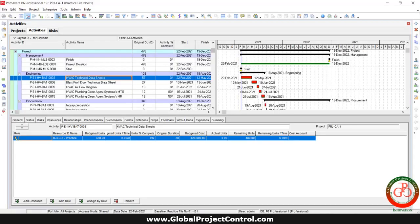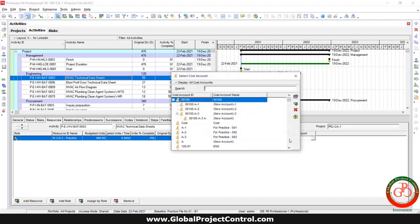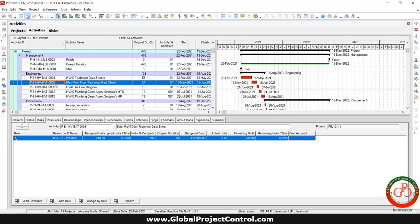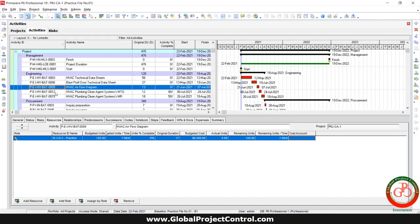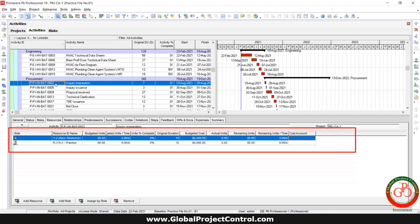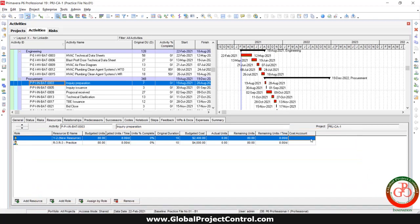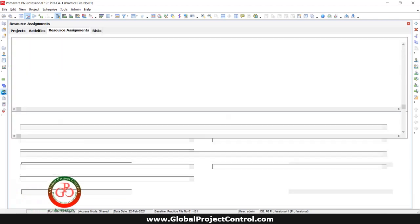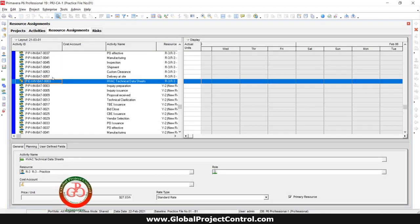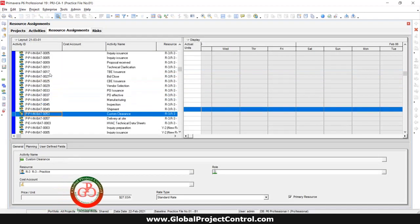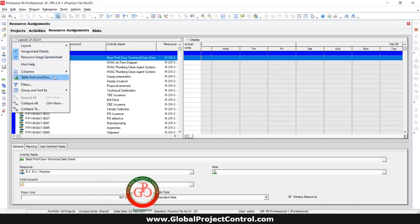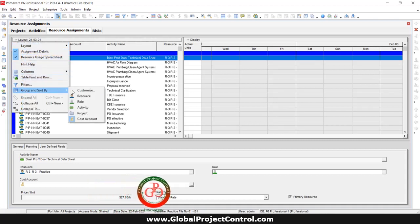So, for assigning the cost account to your project, you need to select the cost account and assign it to your project. But by import, it is much easier because for some activities you have more than one resource and maybe both resources are not included in one cost account. So you should assign it each by each. Maybe the other recommendation for assigning the cost account is to follow the resources based on the other group and sort.